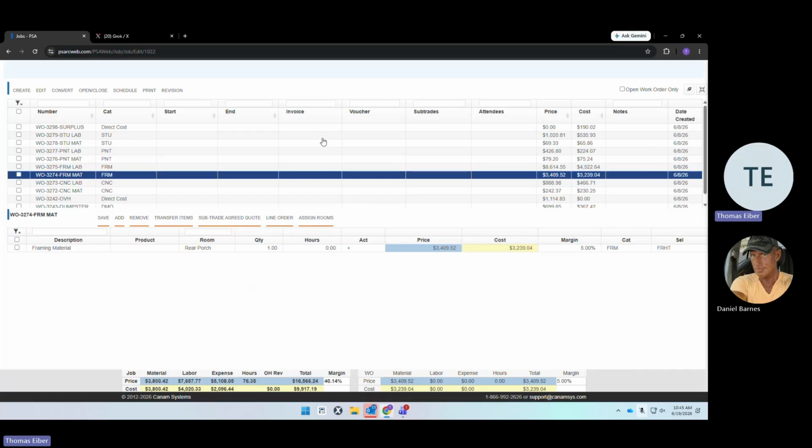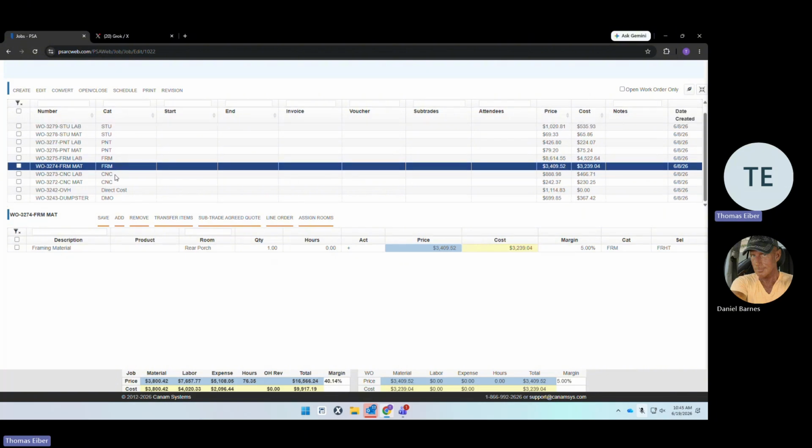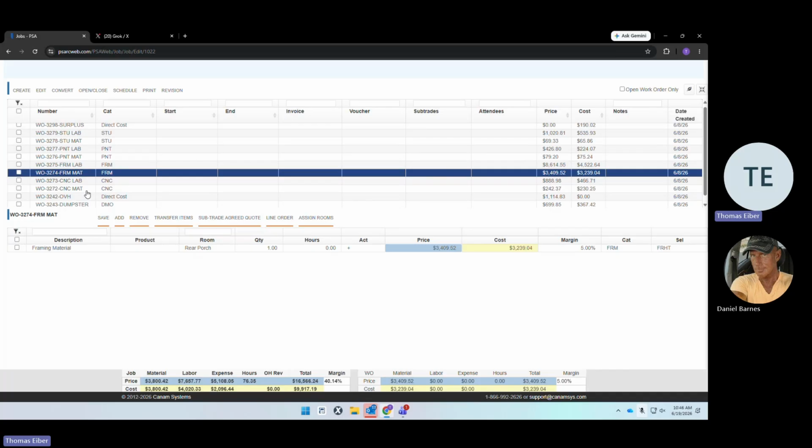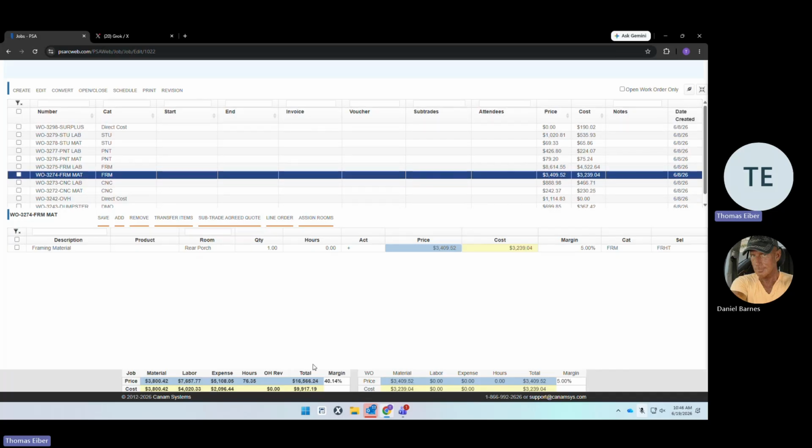But for now, just know that if we do need to allocate money in different places, we need to create our own work orders. As a PM, when you come into a job, this is what it should look like. Not specifically, but just in general. You should have work orders created by an estimator. You should be looking at a margin of an acceptable amount for the entire job. For something that's 16,000, below 25,000 or whatever the cutoff is that you determine with the owners, with your leadership, that's fine. Whatever it is, just make sure that that percentage shows here. If you know that jobs under 25,000 should have a margin over 40,000, at a glance, this entire job is already within those numbers. So we're fine.